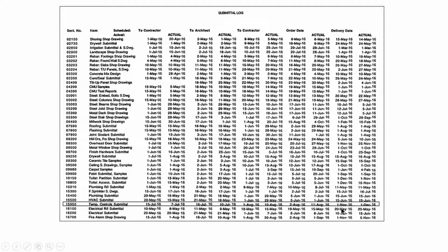The supplier could say that, well, we were supposed to have it by that date. We didn't, so we've moved up another project on our manufacturing assembly line, and that project took us a month to complete. That delayed it by that much. So by all accounts, if we were to look at that and say who is accountable, we could go to the architect, the consultant, and say that they didn't follow the schedule. That would be the "it depends" in action. This happened, this happened, this happened, and this caused this delay. And we've got it all clearly documented.